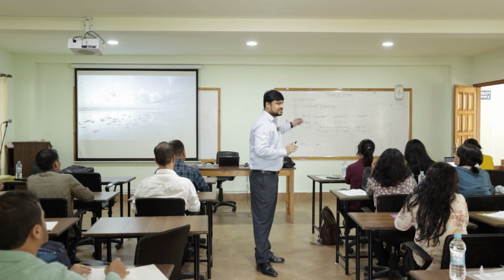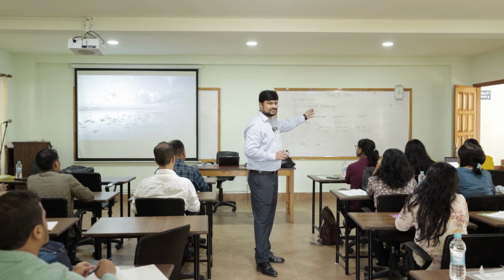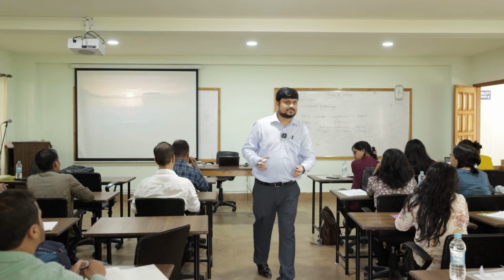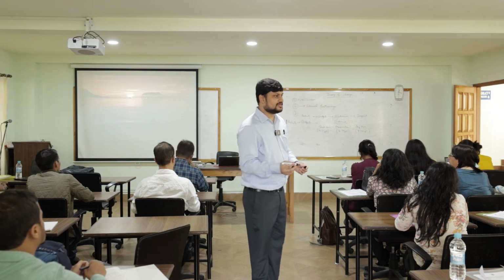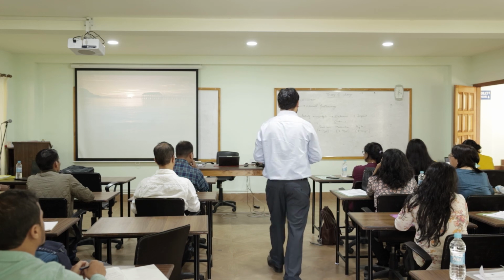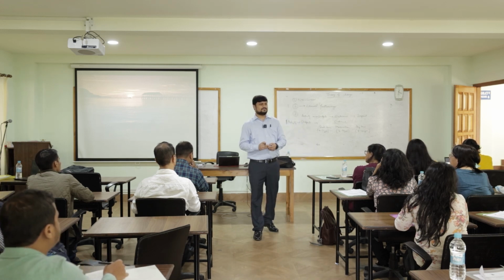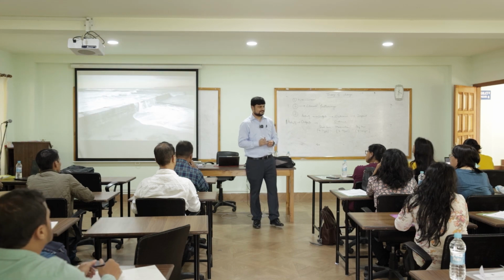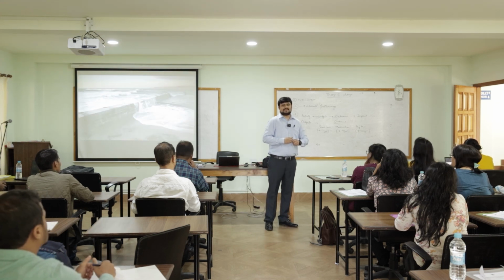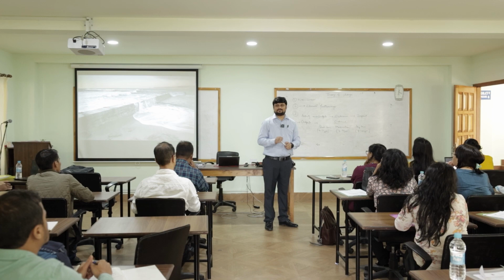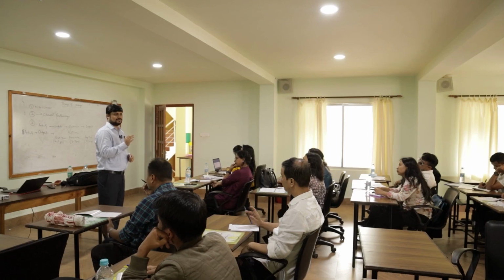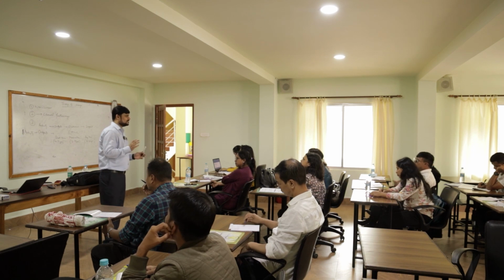If it is a 1-year project, then probably the same numbers that I have mentioned in years could be for months. If it is a 3-year project, again, completely depends on you. 0 to 1 year could be the short term, 1 to 2 years could be the mid-term, and 2 to 3 years could be the long-term. There is no specific definition to mentioning the short-term, medium-term, long-term objectives.